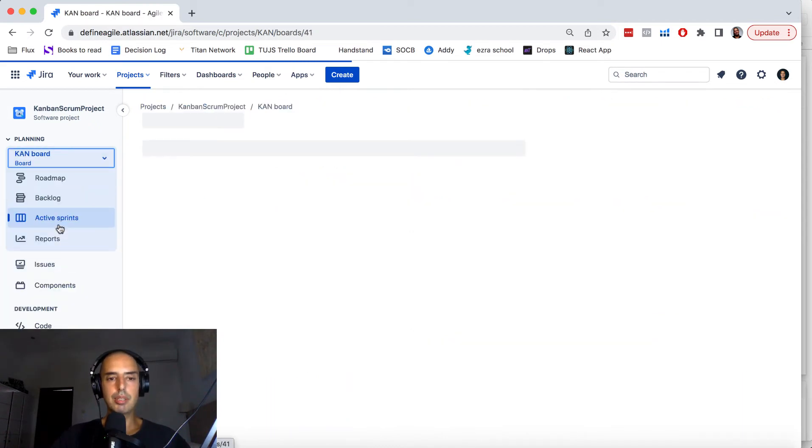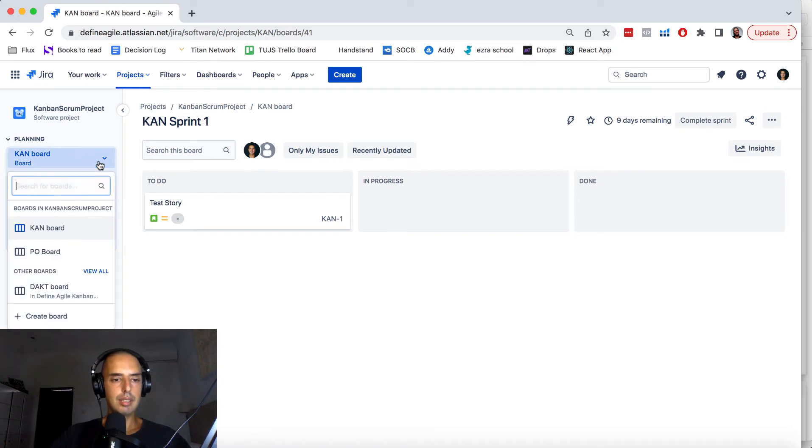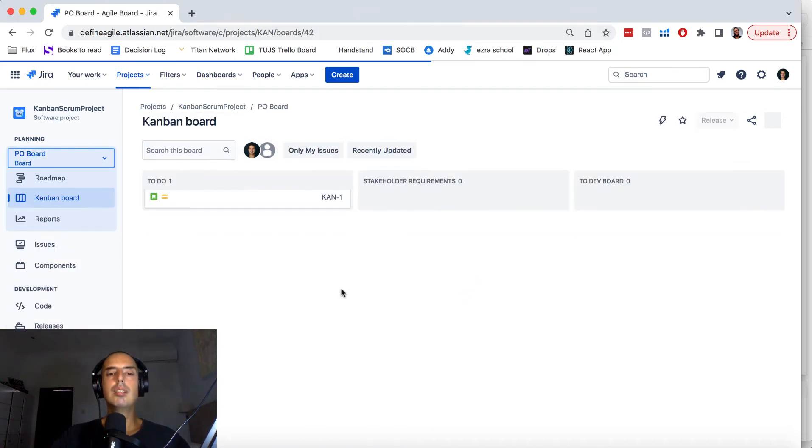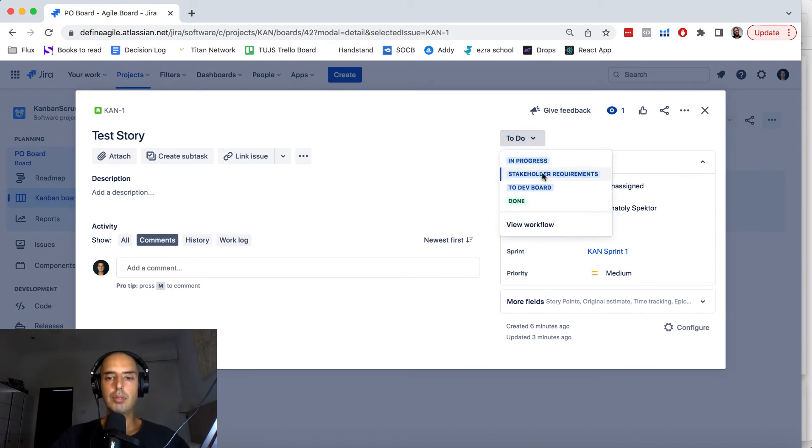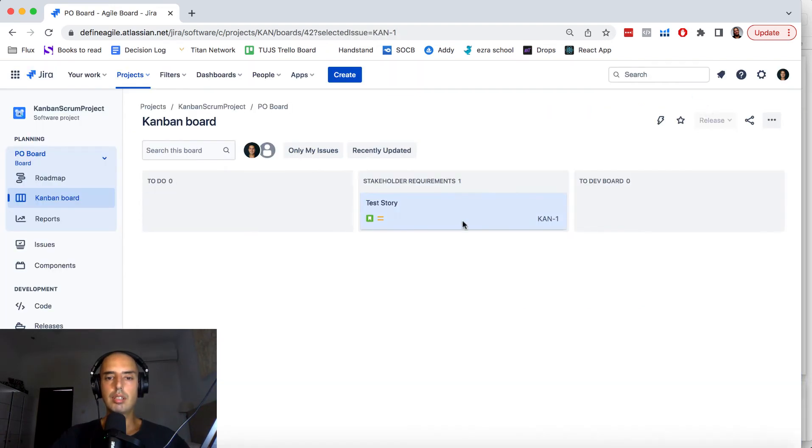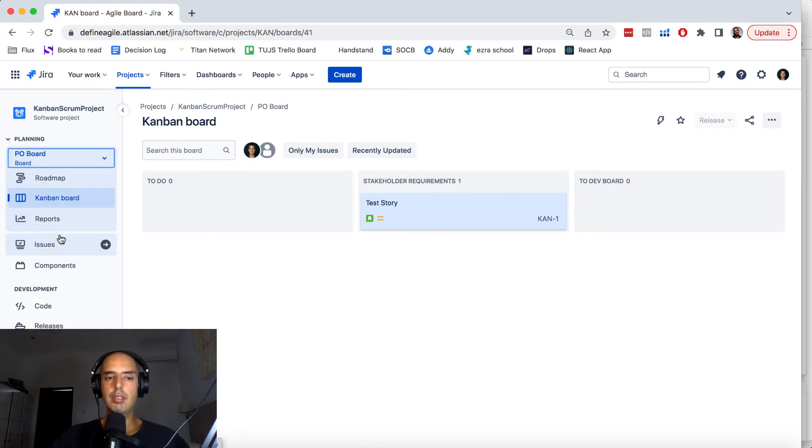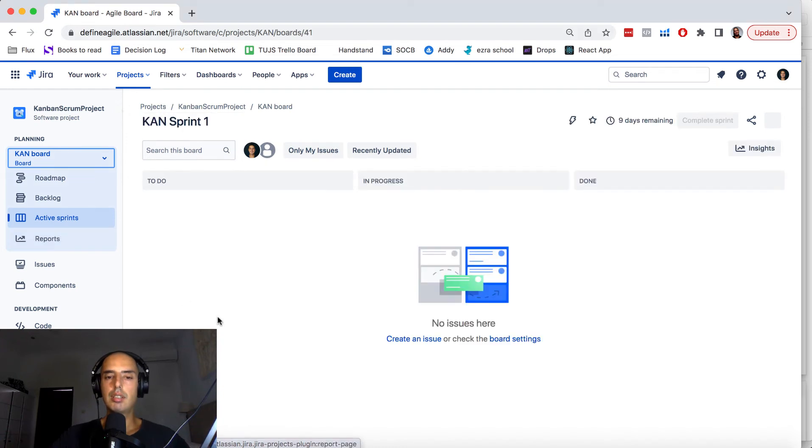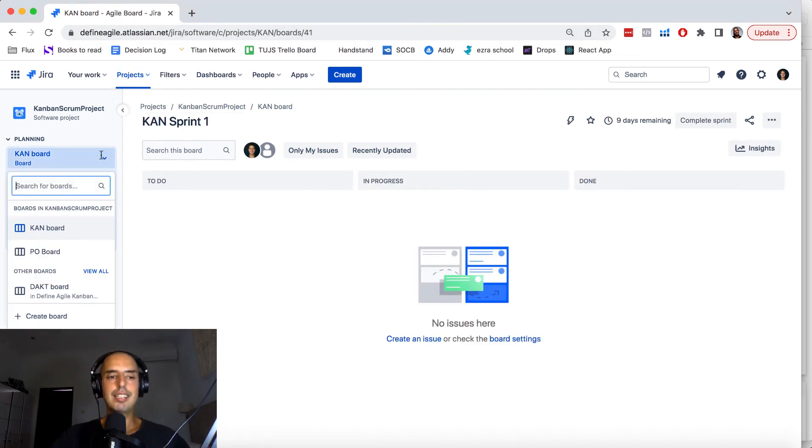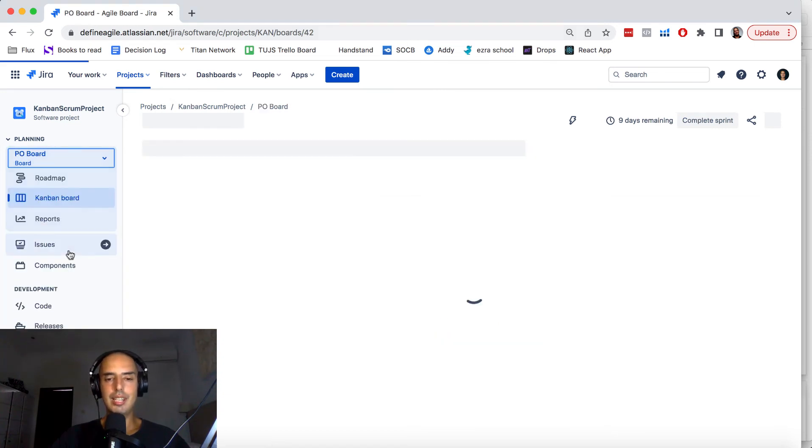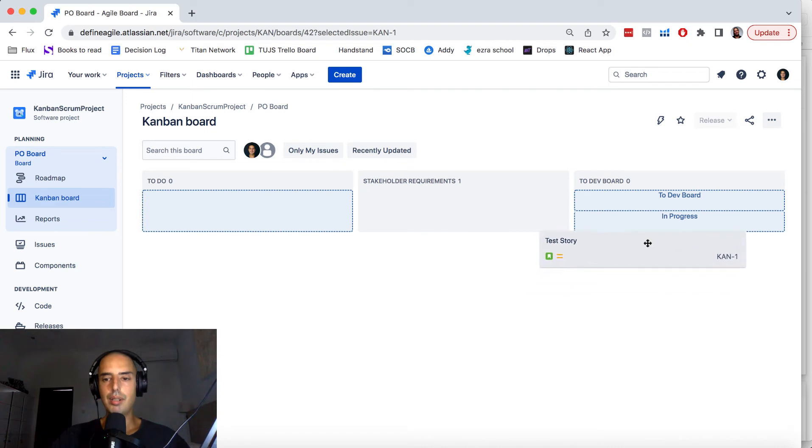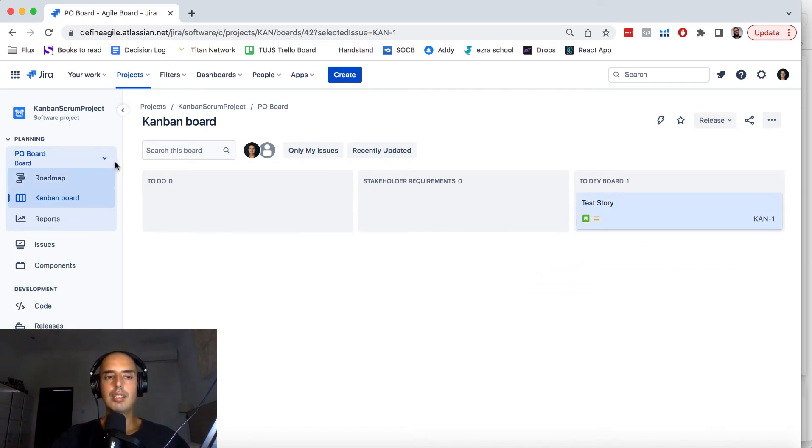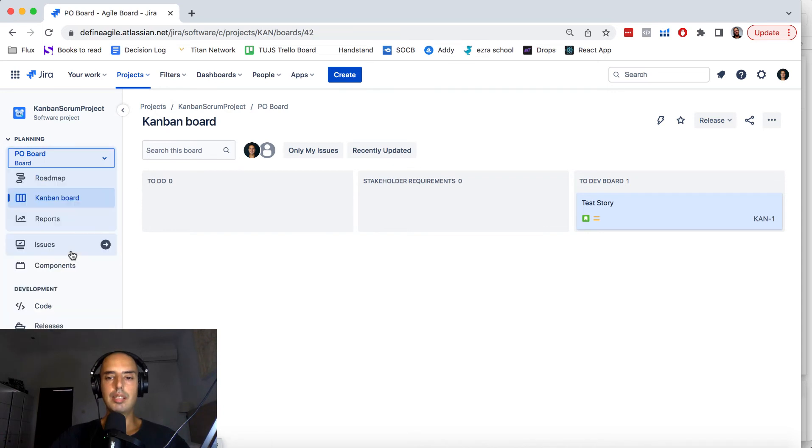Let's get the Kanban board, sorry let's go to PO board. So now if you move to stakeholder requirements it's here but it won't be visible in your dev board. Okay and then let's say you decided that okay it's ready now for development, then you can move it to let's say in progress and then it appears here.